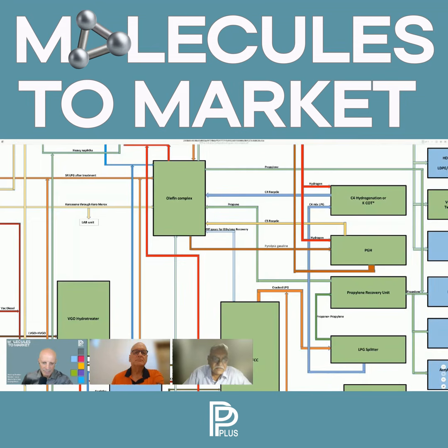Typically, we take about 6 to 7 months. Sometimes it could be 8 months for a project of this size. The one which I mentioned could be 9 months also, wherein we would be at the level of plus or minus 10% cost estimate. This is how we will obtain the investment approval, and now we will go ahead with the implementation.